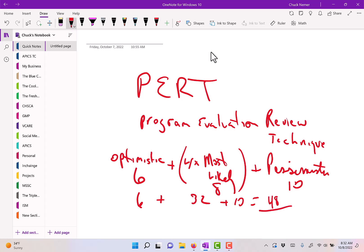Then we average it out—that's part of the formula. We divide by 6, which is the number of data points, and we end up using 8 as our forecast. This works out perfectly balanced and symmetrical because of the numbers I chose, but it won't necessarily always end up that way.